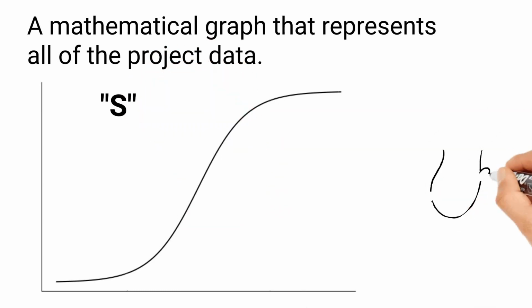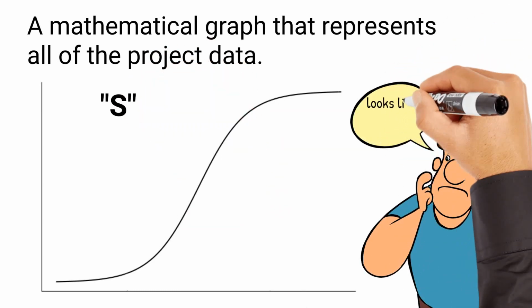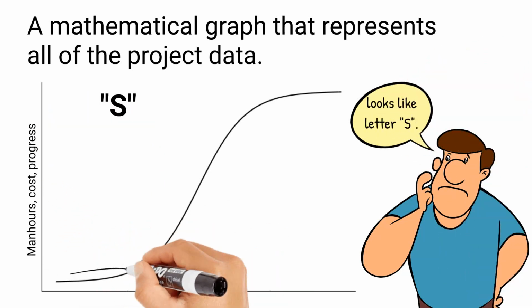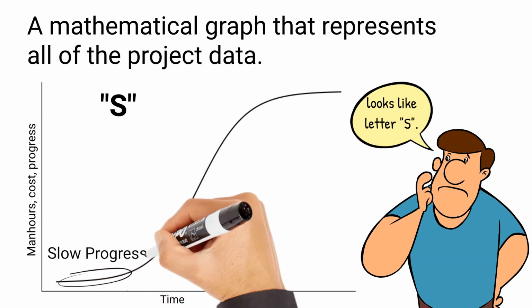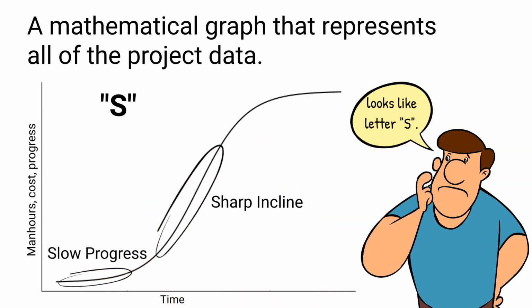This information plotted on the graph is typically the project cost, or the number of hours worked compared against time. At the start of the project, progress is slow and looks more like a straight line, whereas more rapid growth would be reflected with a sharper incline. Many internal and external factors throughout a project's life cycle can impact the shape of an S-curve graph.